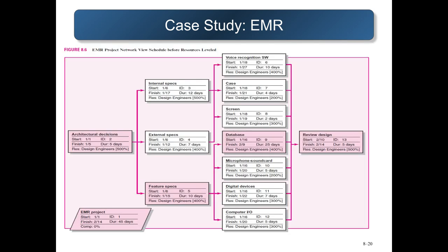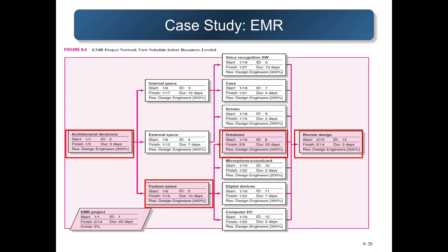Okay. By initially plotting the schedule, we arrive at the critical path of the project being activities 2, 5, 9, and 13, and the finish date would be Feb 14. I won't be dealing much with technicalities and computations since a substantial discussion was already provided by Jerwin earlier. Our goal here is to translate the manual computations done earlier and apply them to a PM software representation, wherein it will give us an array of functionalities, perspectives, and decisions to make.